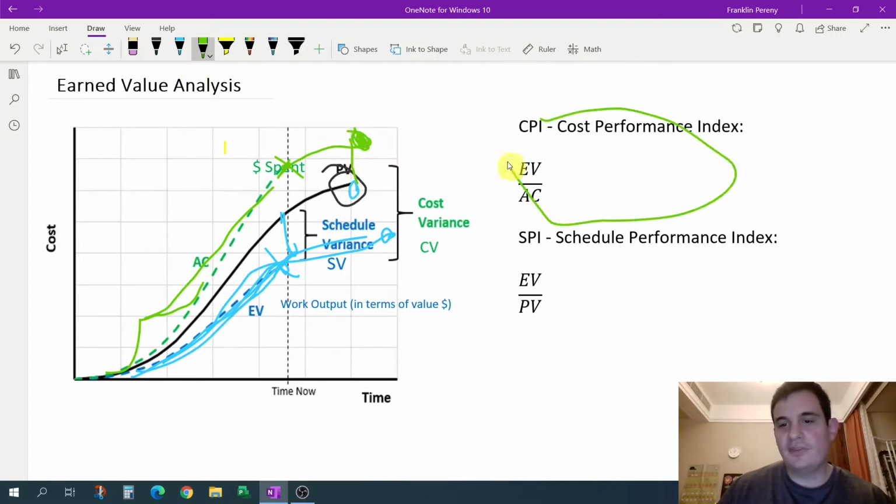So that's what the cost performance index is telling you. It's a prediction of the future based on the past. You have your plan line, your PV, and you have this cost performance index based on historical data, and you're just using this factor to calculate a new future. And you're doing the same with the schedule performance. Based on the past, we're either ahead of schedule or behind schedule by a certain amount, which creates that ratio.